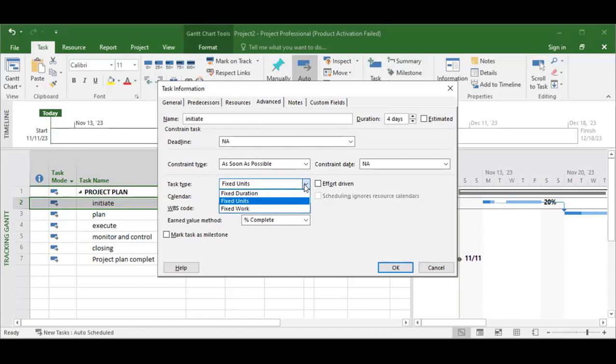All right, the duration is there, the quantity of the work that you want to do is there, and the unit that you want to do is there. If you fix one, then you are able. If you make one to be fixed, then when you make a change in the second one, the third one will change. The other one will be fixed. So those three, there are three constraints.